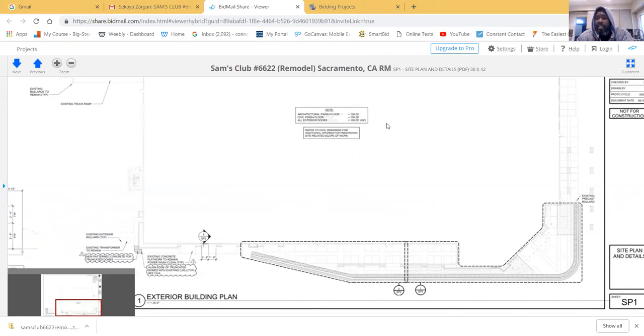framing, and things like that, because there are so many parts to this. On the foundation, you may need to call out every anchor bolt, right? Every slab, every section that's a grade beam and things like that. You may need to call out those sections, highlight them, and account for those separately. Okay. For this type of work, I don't need all that. And I'm familiar with it as well.